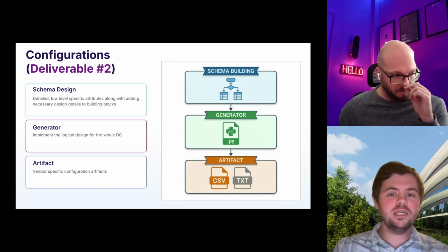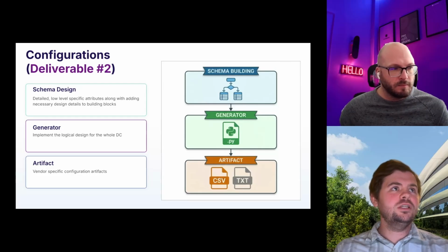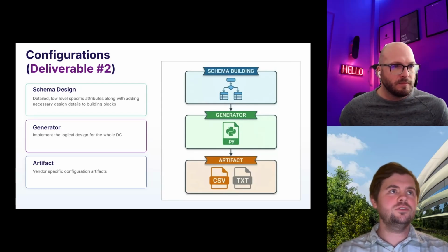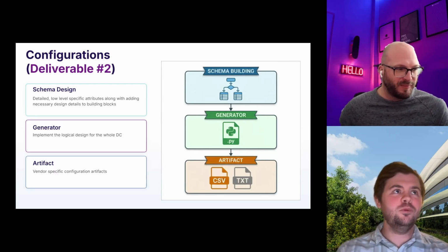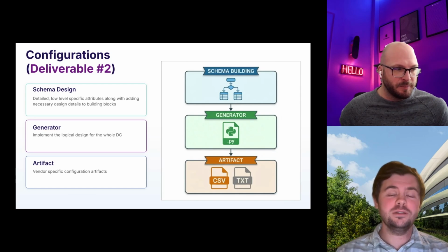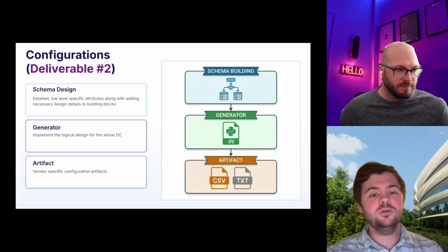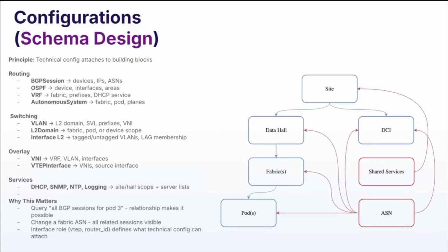We were focused on delivering a cable plan, because by the time the engineers on site have started cabling, we should be deploying config. We got the cable plan, they start cabling, and by the time they're finished cabling, they're going to power these devices up, and the config should be ready.